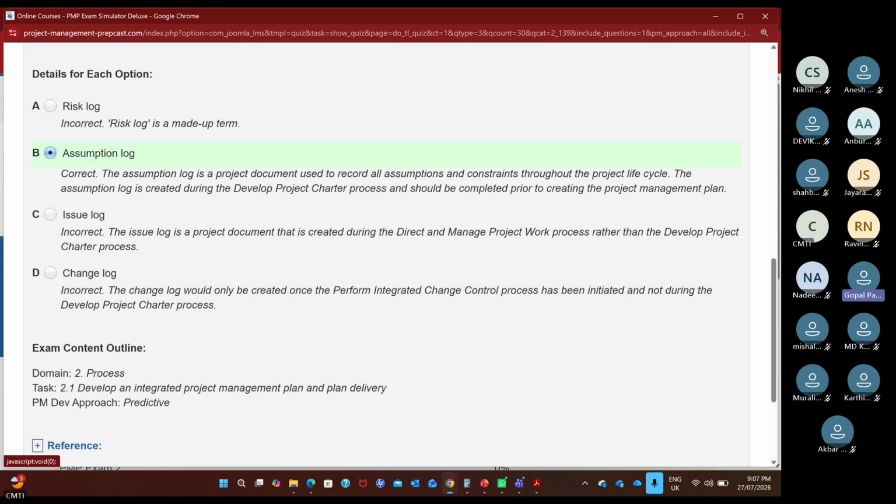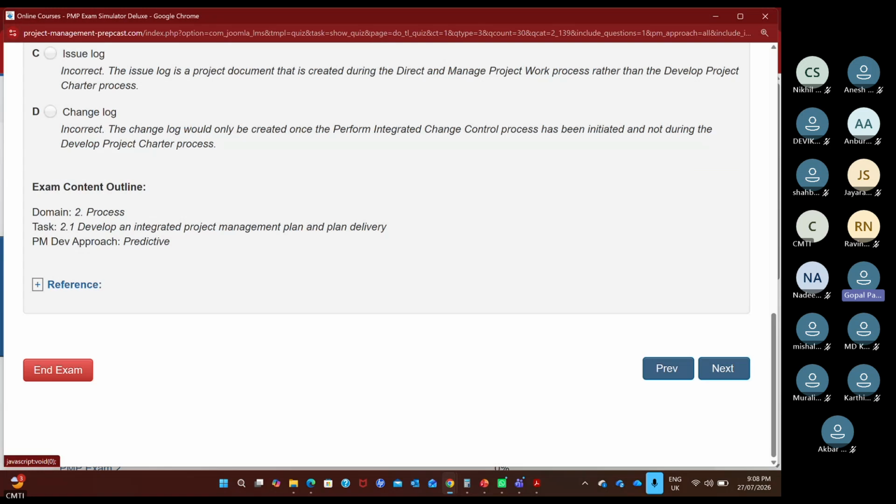Okay, sir. Right. As a project manager, once your project charter is issued, now you become a project manager. Now what is your next step? You read all the contracts, business documents, benefits management plan, as well as your company OPA. Then you will have some assumptions about the deliverables, project, stakeholders, and that information you will document. That's called assumptions. It is just assumption.